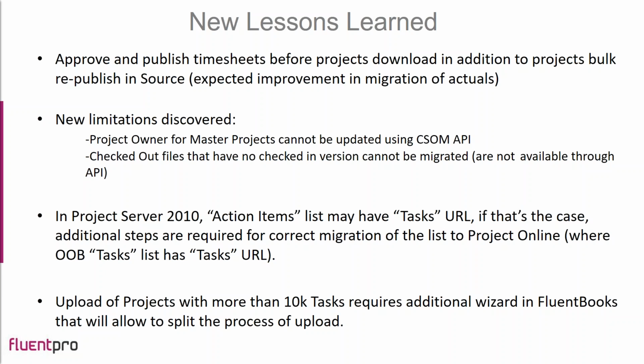Basically, the tasks list in Project Online is not editable. It can only be synchronized from the schedule. So in order to keep action items from Project Server 2010 during the migration, additional steps are required to correct the URL of this list. And in Project Online, you will have both the tasks list with synchronizable items and the historical action items list with your items.